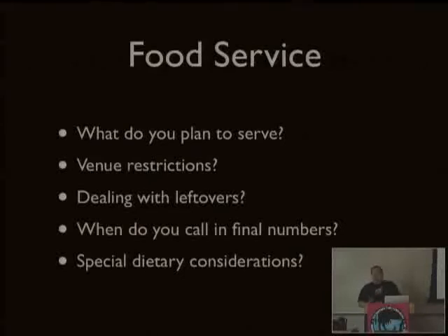When you talk to food service, you're going to call in two different numbers. You're going to have to give them an estimate of about how many people you're going to serve. And that estimate's usually going to go in maybe 2 to 3 weeks ahead of your event. So you may say, we think we're going to have about 120 people. But then they're going to want you to call in a final number. And you're going to have to find out how much lead time they want. They'll give you a deadline.